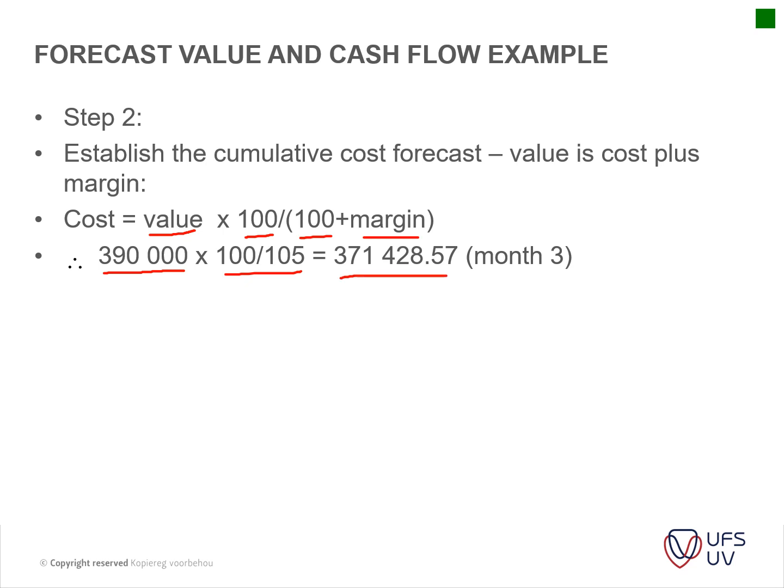So this is your cost on the project. Okay, very simple. So it's basically your expenditure. You're making 5% profit on the amount that is done for that month. Okay, so I hope everyone understands that. So it's your value of work minus basically your 5% from that, which is the same as basically 100 over 105.